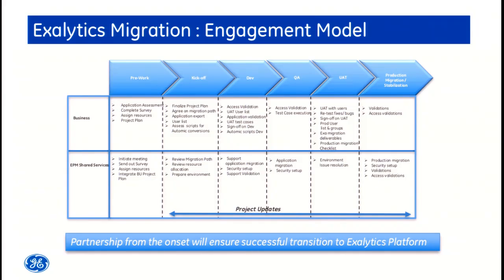And that's important because what we found early on was if we just let them move through in the need for hitting project deadlines, they would jump into the next environment and then we would get a rash of tickets. Oh, Exalytics is terrible. HFM doesn't work. The users are miserable. And we traced it back to simple unit testing issues. Well, you never unit tested your app. You would have found this out if you had tested it before it moved to QA. So we put in more stringent toll gates. And now we get less problems when we move into UAT.